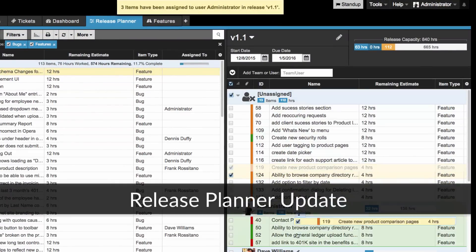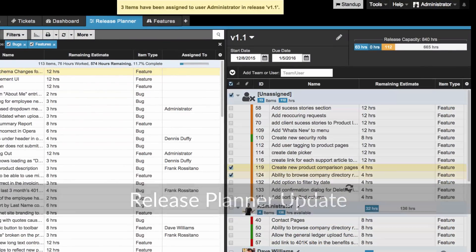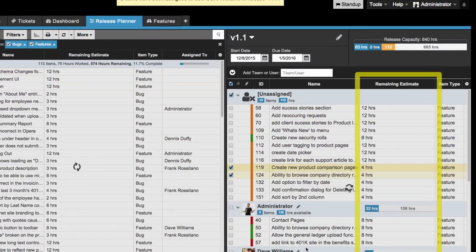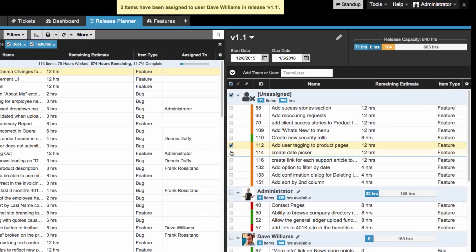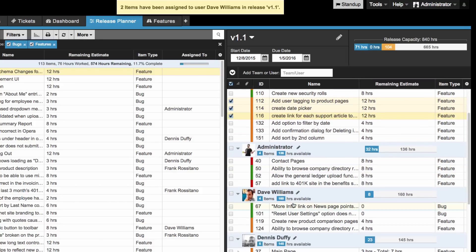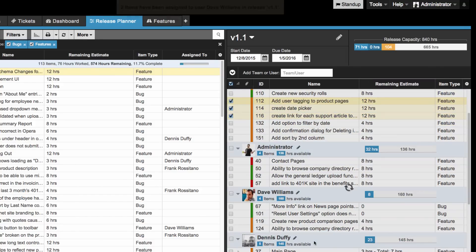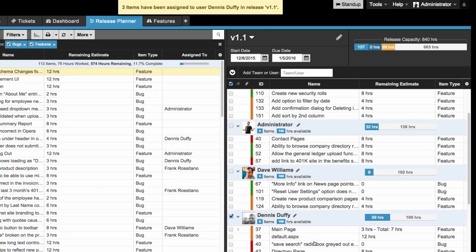Next, we updated the release planner so that it uses the remaining estimate of an item when you're assigning an item to a release. This should allow you to plan your upcoming sprints more easily and accurately, since it takes into account work that has already been done.